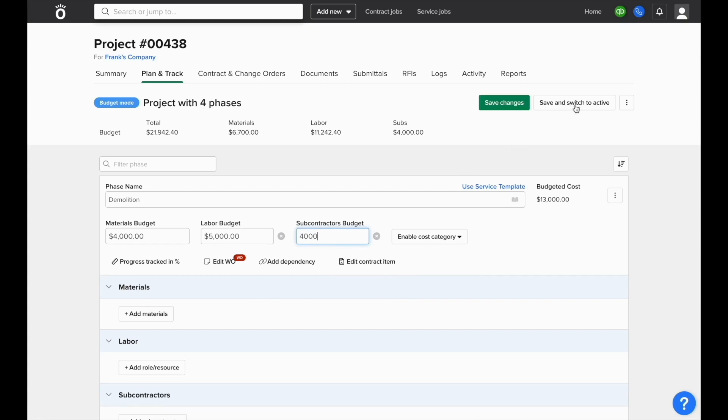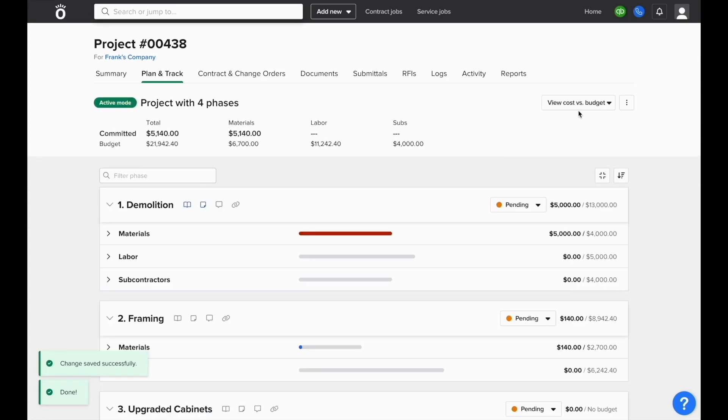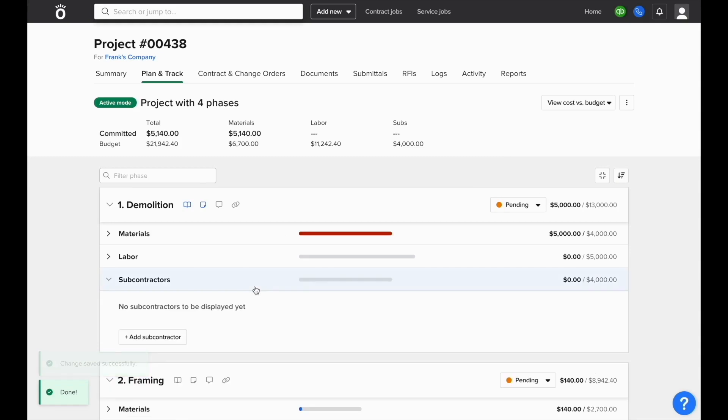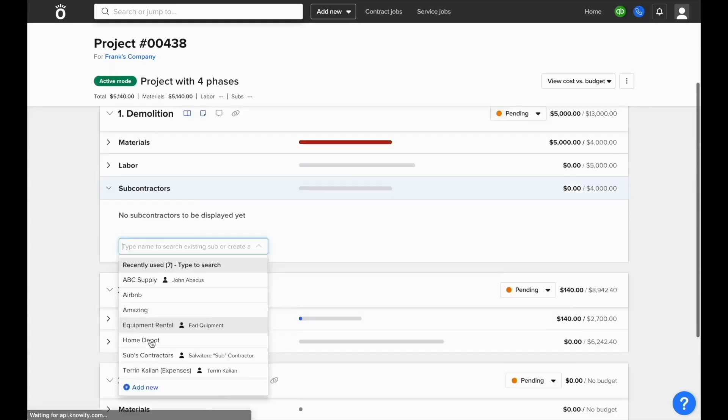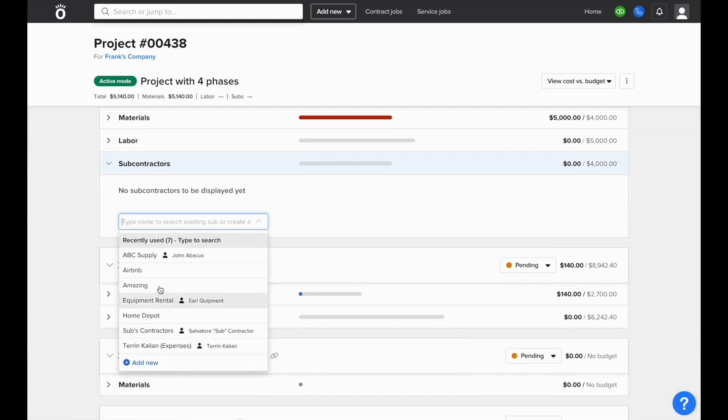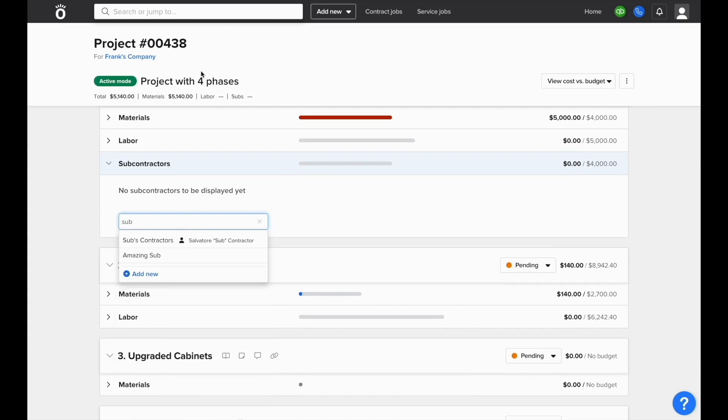Then once this plan is active, we'll be able to go to the subcontractors category of this phase and add a subcontractor. When we select this option, we'll be prompted to select who the subcontractor is and we'll use the vendor that we set up earlier.